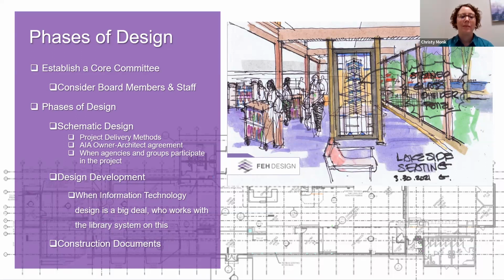And again, at the end of each of these phases, schematic design and design development, we do update the project budget. That's, again, a very critical component so that any shifts in the industry that have affected anything that we are planning on doing can be adjusted, can be modified, can be enhanced possibly, just depending on where costs happen to be going. Again, it's a moving target. Nothing is static about costing in the real world. They change pretty regularly, and you really should expect your team to be able to manage that budget as well.